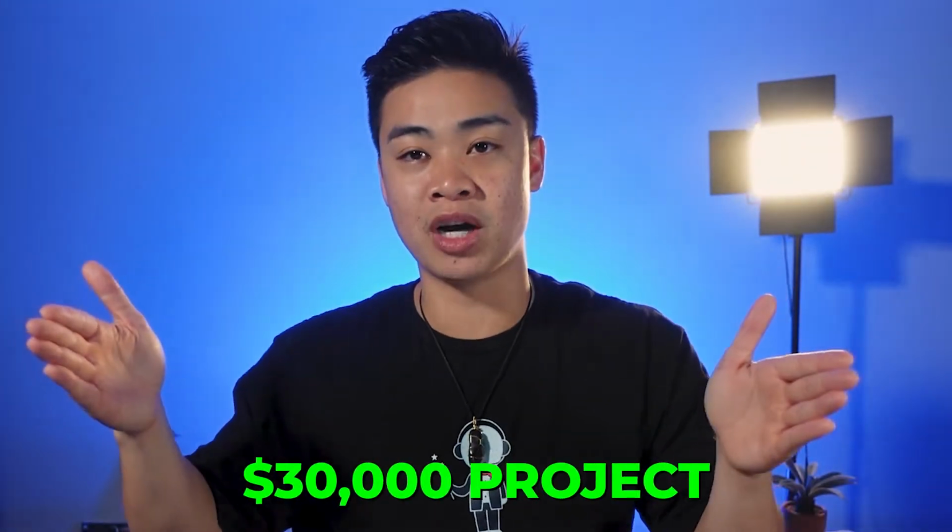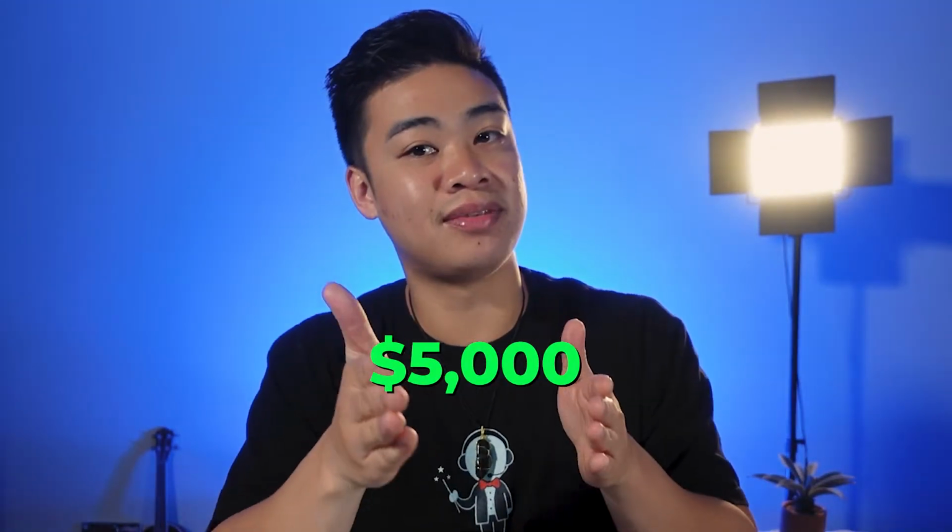And typically how I pay contractors is, I see a certain amount of work has been done, and then I pay them for that amount of work, and they just keep doing it. So I pay in little increments. If I have a 30K project, they do 5K of work, I pay them 5K. They do the next 5K of work, I pay them 5K. And so on. That's kind of how it works.